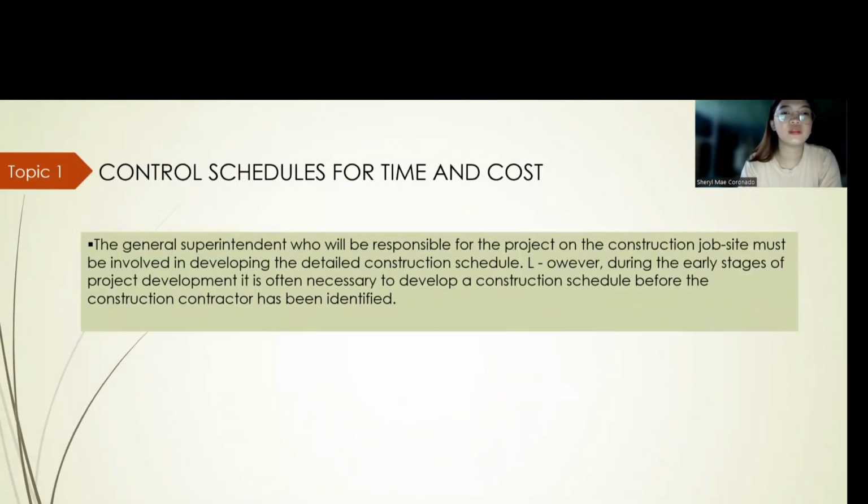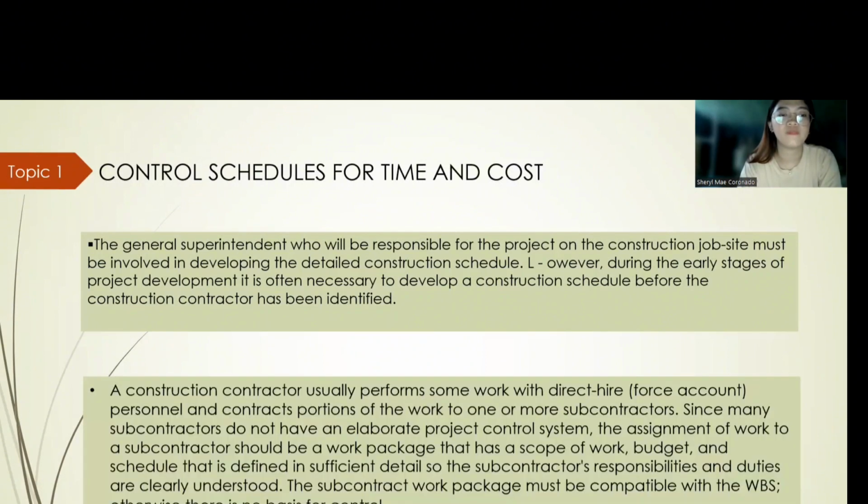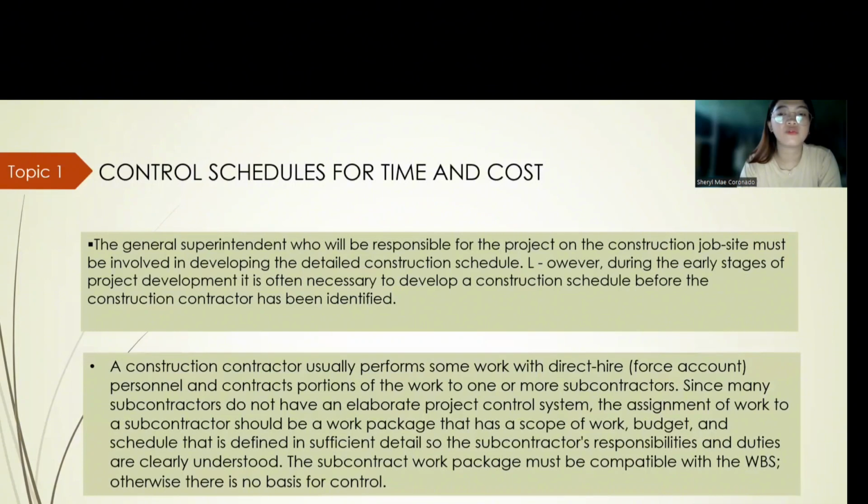The general superintendent who will be responsible for the project on the construction job site must be involved in developing the detailed construction schedule during the early stages of project development. It is often necessary to develop a construction schedule before the construction contractor has been identified. The construction contractor usually performs some work with direct hire, force account personnel, and contracts portions of the work to one or more subcontractors.